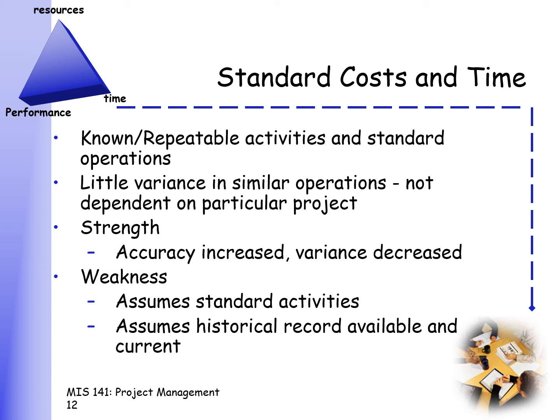That you have the same skill set as they have, and you know the same platform as they have, and so on and so forth. So for this type of scenario, if it is a known repeatable activity and it's a standard operation, you can use standard costs and time.